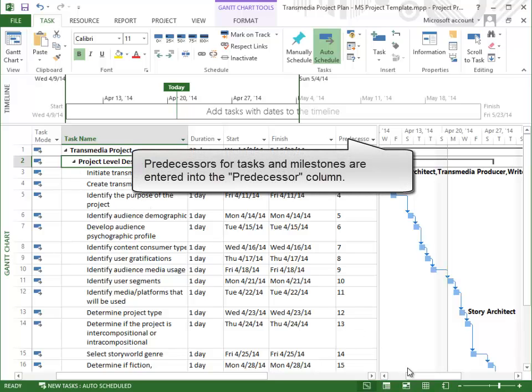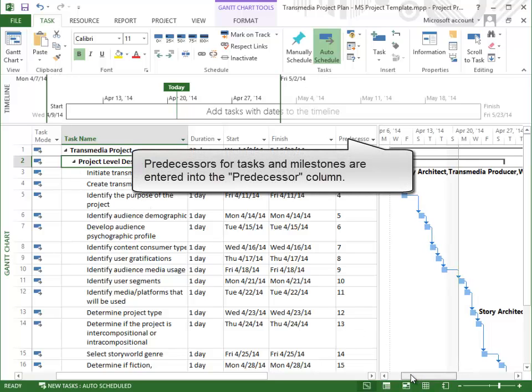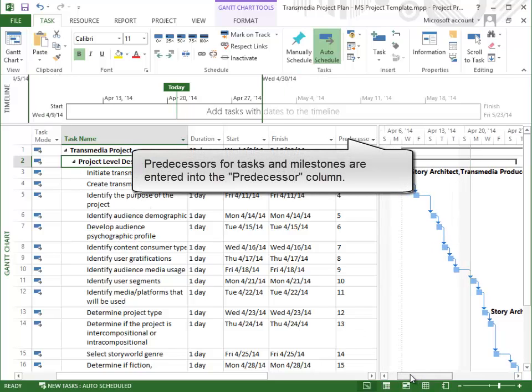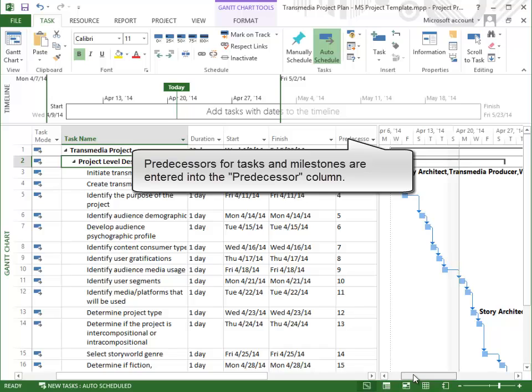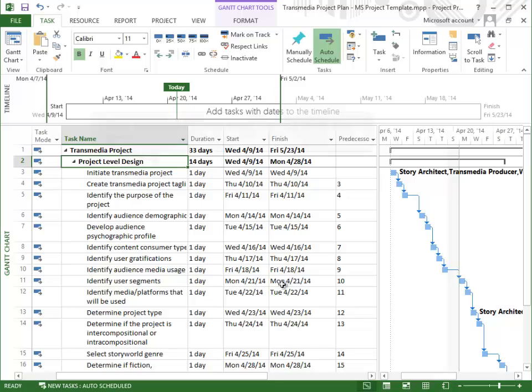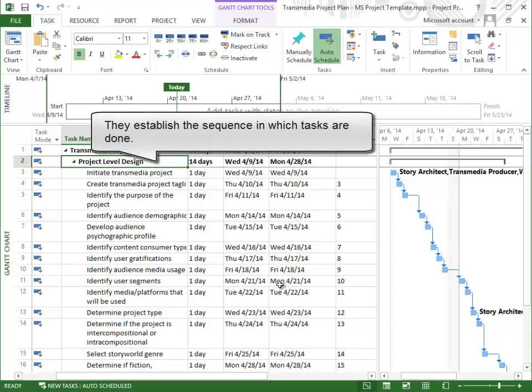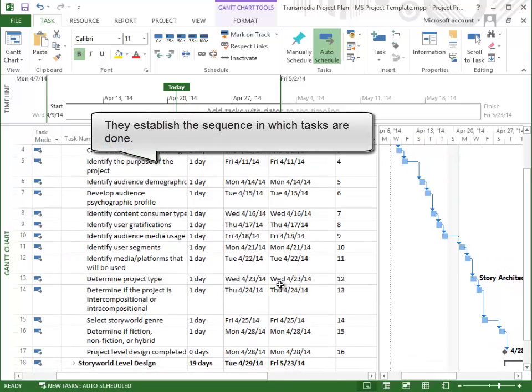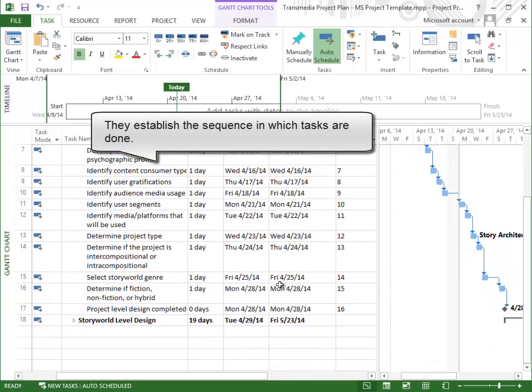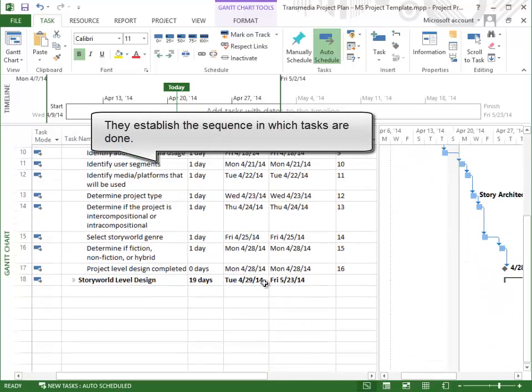Predecessors for tasks and milestones are entered into the Predecessor column. They establish the sequence in which tasks are done.